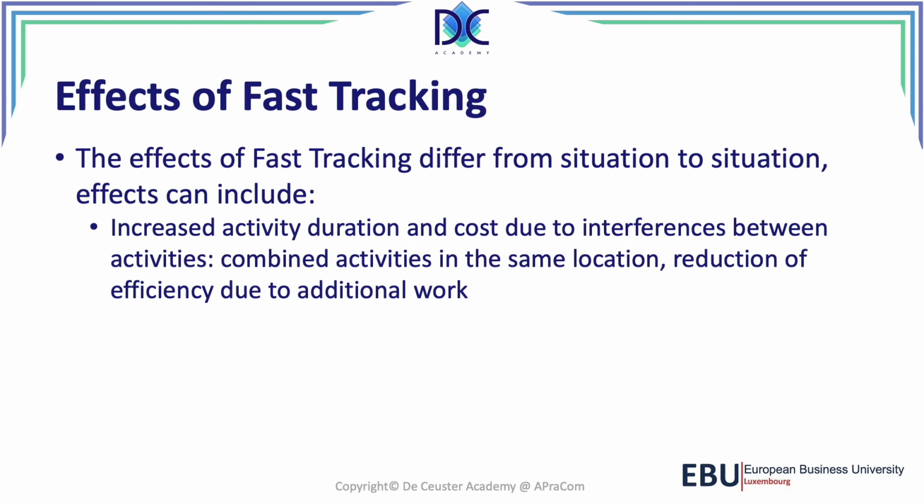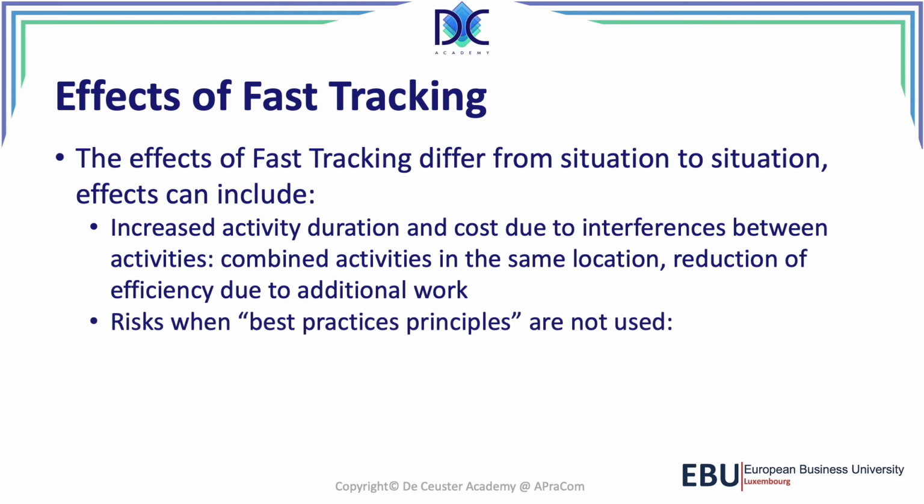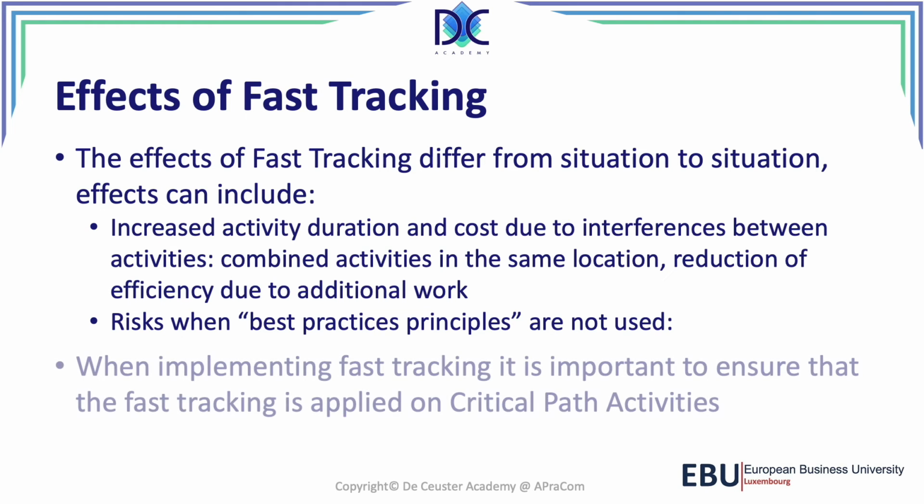The activity duration can increase, and the cost can also increase due to interferences between activities. We consider here combined activities in the same location, and there is, of course, a reduction of efficiency due to additional work that may have to be done to guarantee the quality and the successful completion of the work. Now, there may be some additional risks when the best practice principles are not used.